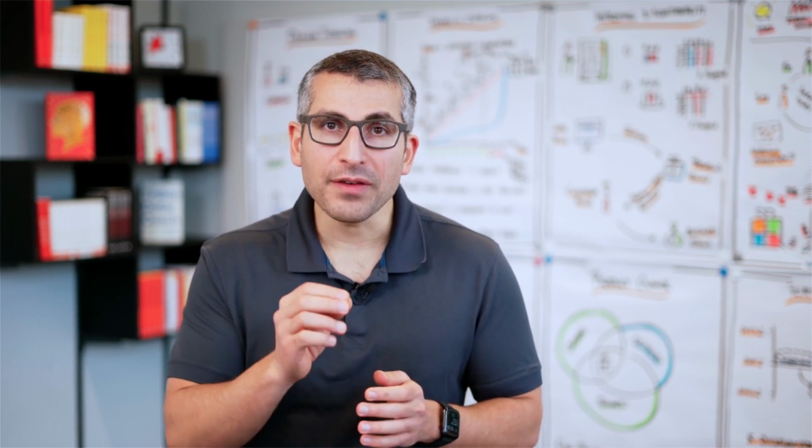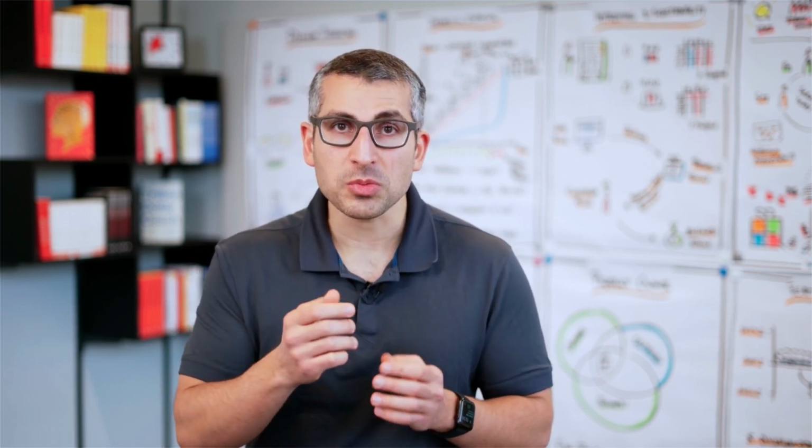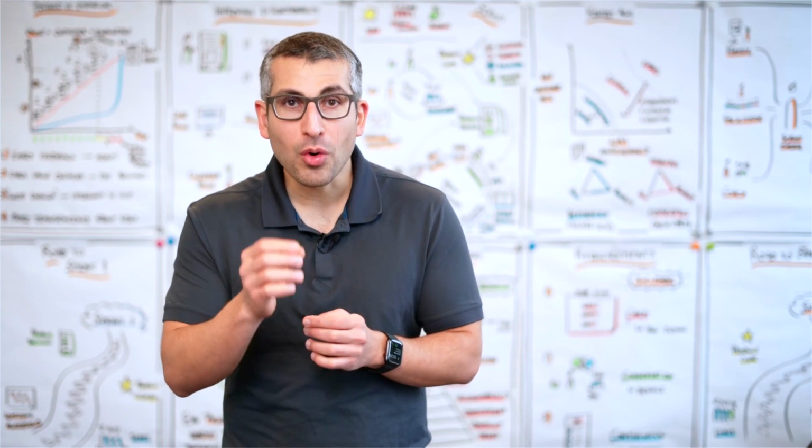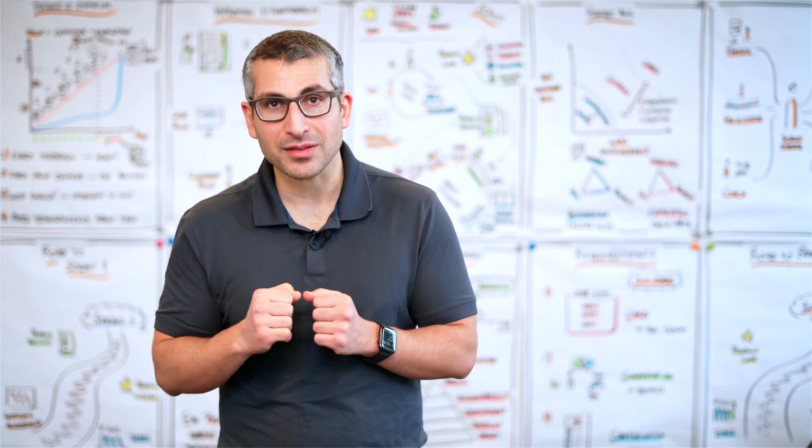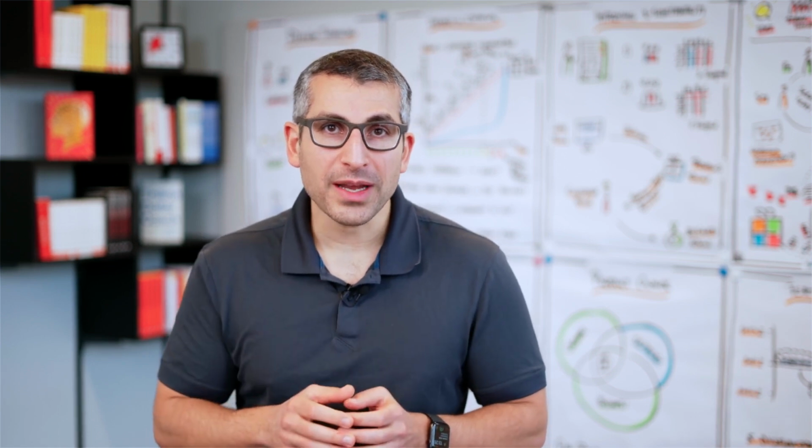As long as you have very few dependencies and you can visualize them using the arrows in this prioritization matrix, it is still fairly simple to move from this 2-dimensional matrix to a 1-dimensional and prioritized product backlog. But if you have more than one or few dependencies, this whole thing can become a mess. Also, this prioritization matrix does not account for other dimensions. For example, compliance or regulatory. It also doesn't account for urgency in terms of time.